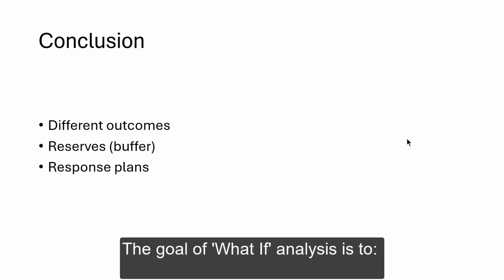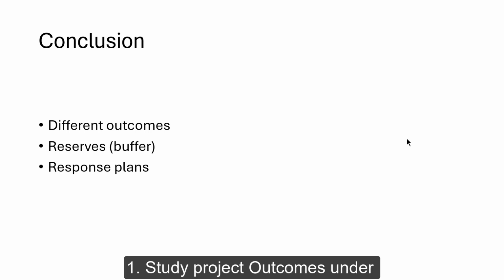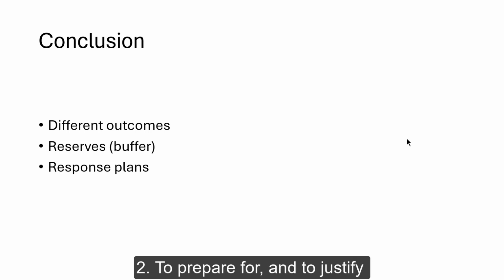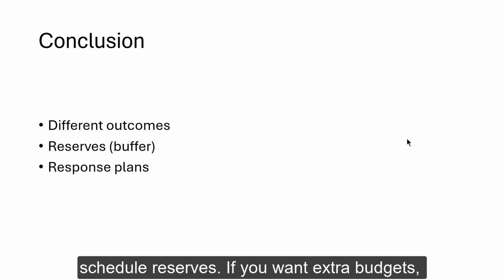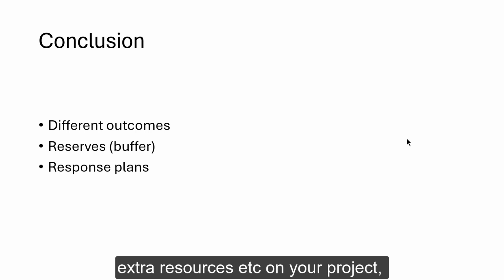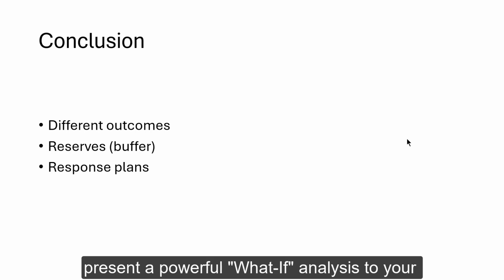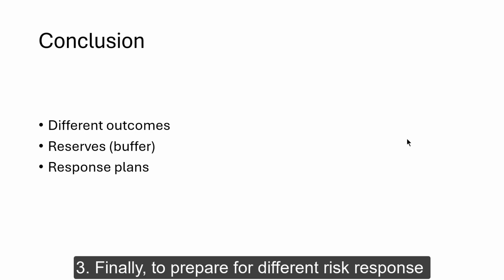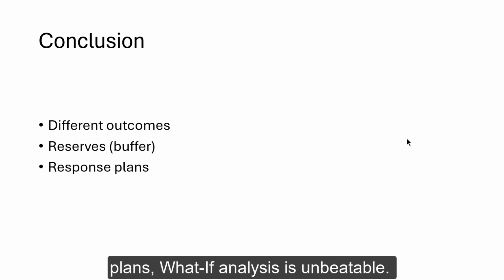The goal of a what-if scenario analysis is: 1. Study project outcomes under different scheduling conditions. 2. To prepare for and to justify schedule reserves. If you want extra budget, extra resources, etc. on your project, present a powerful what-if analysis to your management and to your customers. Finally, to prepare for different risk response plans, a what-if analysis is unbeatable.